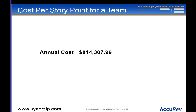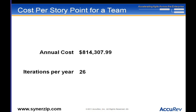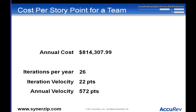Part of a scrum master's time — because they're working on multiple teams — part of a product owner's time, and part of a manager's time managing multiple projects are included, but the QA, dev, and doc folks are all fully dedicated to that team. So the controller gives you the fully loaded cost of that team for a year. Their iteration length is two weeks, so that means 26 iterations per year, and their iteration velocity is 22 points — giving 572 points per year.